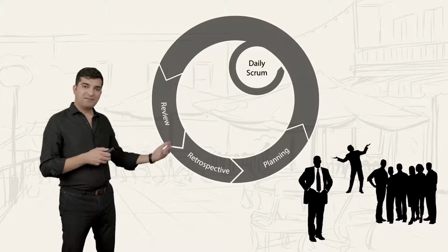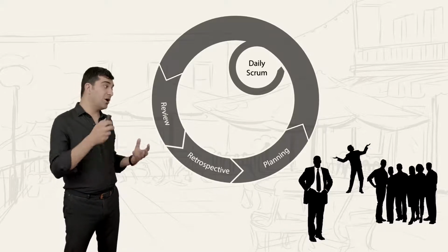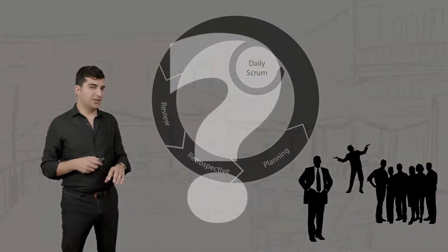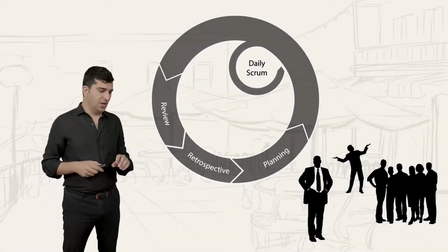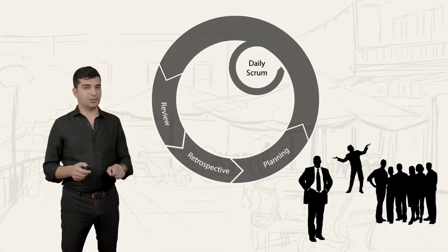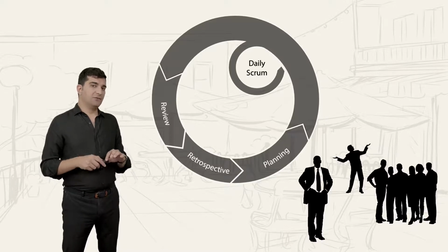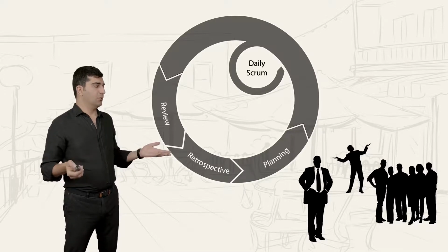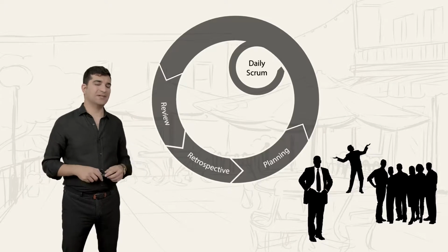So you don't have time between the two of them to work on your product backlog. And on the other hand, do you remember the time box duration of sprint planning? It's okay if you don't remember for now. It's 8 hours in a 1 month sprint. 8 hours may not be enough to refine the product backlog. So when should we do it? I think it's obvious now. We're going to talk about it in the next lesson.